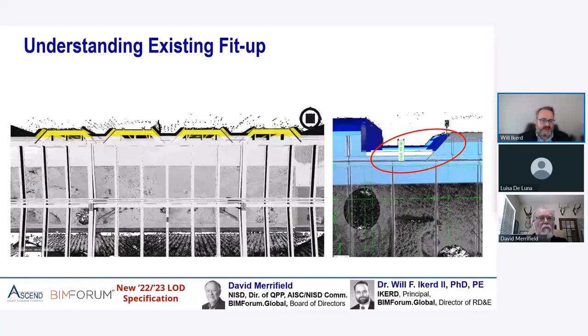And there is defined grammar when it comes to LOD in writing the scope, schedule, and fee. And additionally, when construction litigation does happen, everything goes back to that defined grammar for that project, for its BIM execution plan, hopefully if it exists, and the LOD definitions that are in it. And so particularly as reality capture begins to expand in usage, this is a good case study to think about.